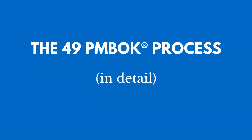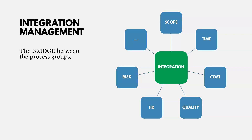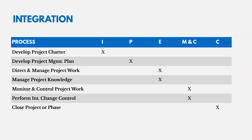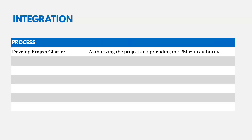Now let's talk about the 49 PMBOK processes in detail, going by knowledge area. We'll start with integration management, which is the bridge between the process groups — it brings everything together, it's the glue. There are seven processes in this knowledge area, spread across process groups. The develop project charter process authorizes the project and provides the PM with authority to get started and use resources.